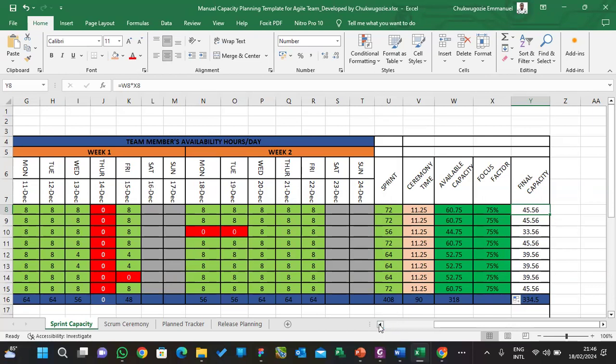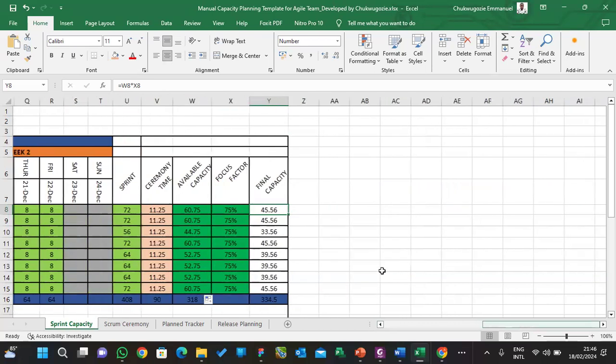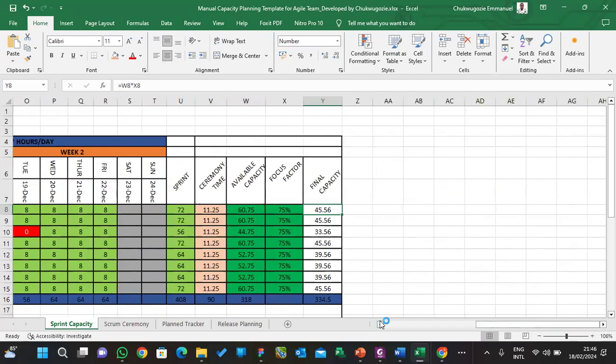Why the other person may work, another person depending on all that. So it means that any work you are going to assign, any task, the workload Wisdom is going to have must not exceed 45.5 hours or percent. In Jira, this will translate as percent, right? So it must not exceed 45.56% for Wisdom for the whole of these 2 weeks.